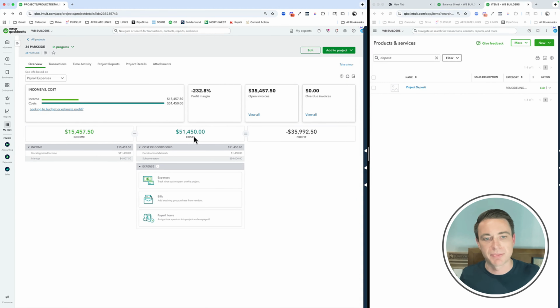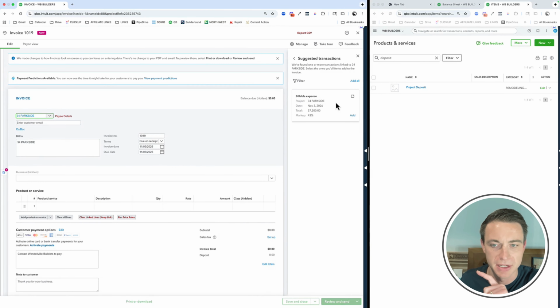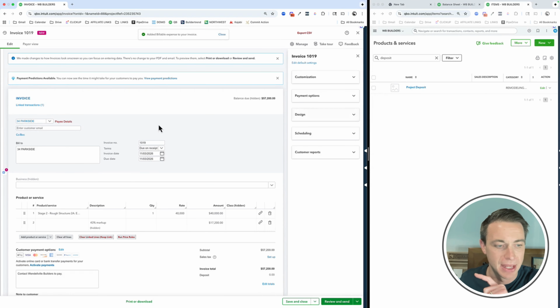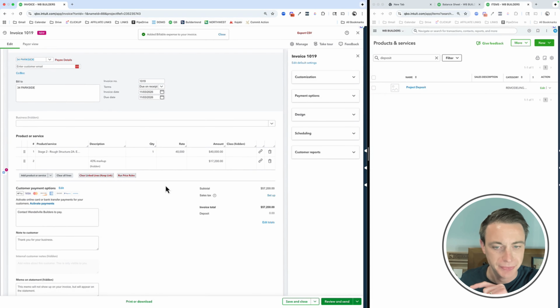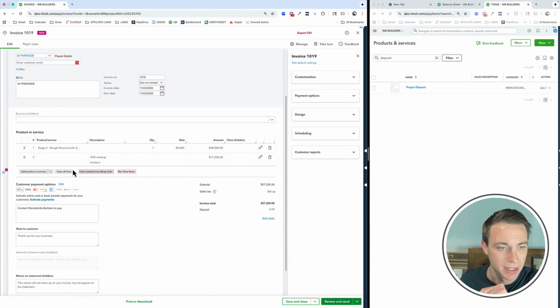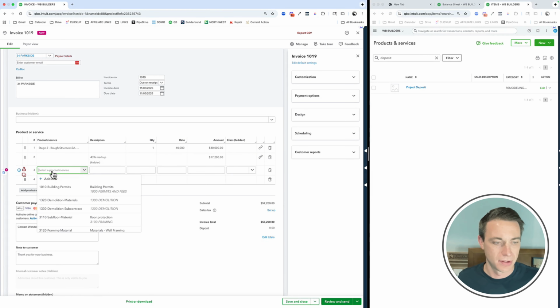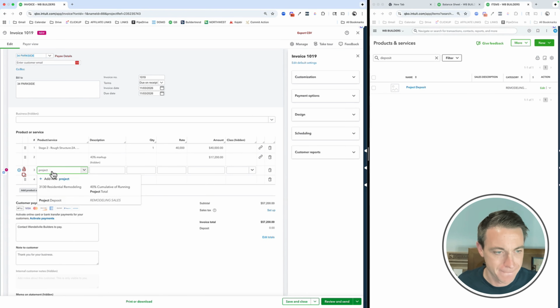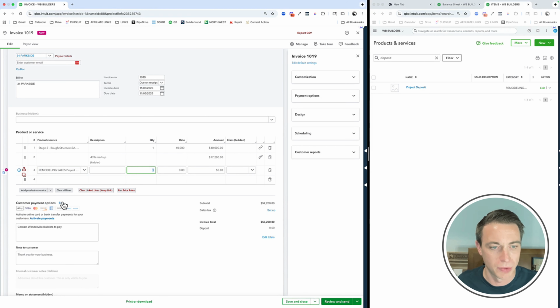And what I like to do with that deposit is we credit it back on the final invoice. All right, so all we do is final invoice of the project. Let's say we're done. And I know, obviously, my numbers aren't working out to be exact here. I'm going to do an invoice, the final billable piece here. We add that. And then the last thing we do is we simply add a line where we do project deposit, okay, and here we have $20,000 on our books.